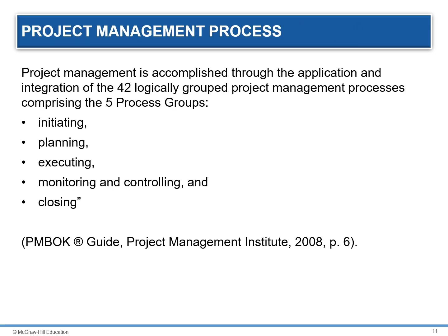Project management has a structured procedure with different steps. It is accomplished through the application and integration of the 42 logically grouped project management processes, comprising the 5 process groups, including initiating, planning, executing, monitoring and controlling, and closing.